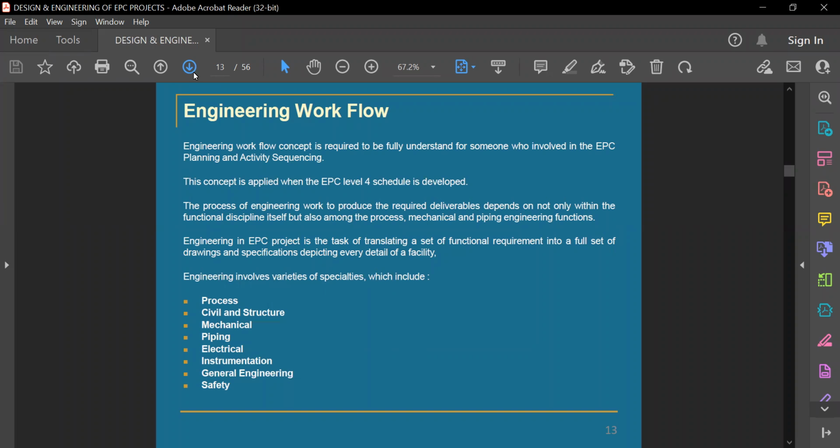So they will make the project schedule. In the first phase, it will show who will give which document, which drawing, and what documents or drawings are prerequisites for me or any other discipline engineer to go ahead. For example, instrumentation or piping engineers need PNIDs. So the process engineer will go for preparation of the PNID based on the process flow diagram.